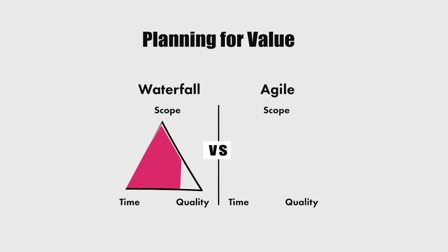In the Agile deliveries, we have a fixed time and we have fixed quality depending on what quality we actually wanted, that we decided on and agreed on. But scope, that's something that we usually cut, and we deliver what creates value instead.